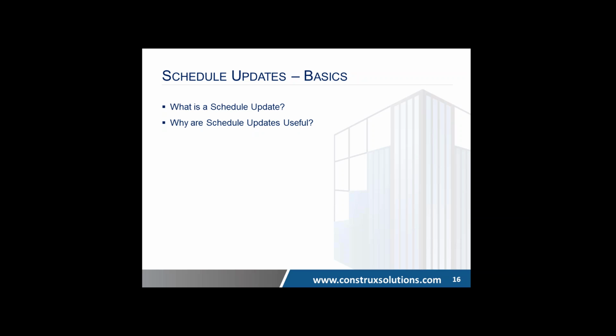So that's essentially why it's very important to catch your schedule up to now, take a look at the project, take a look at the impacts to date. If there's been any delays, you can overcome them. You have to know why they happened. If you've been impacted elsewhere, you can begin to adjust durations to reflect actual, real-world durations that you're seeing on your job, and then it may recalculate your critical path and that sort of thing. So it's very, very important and useful. If you are going to create a baseline schedule, it is worth the time to update it very regularly.